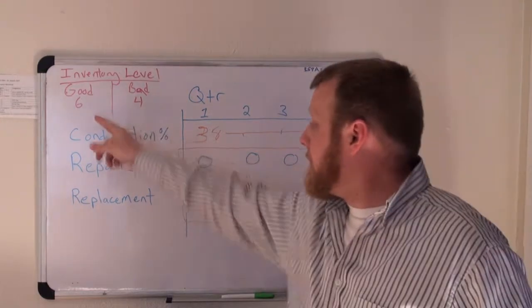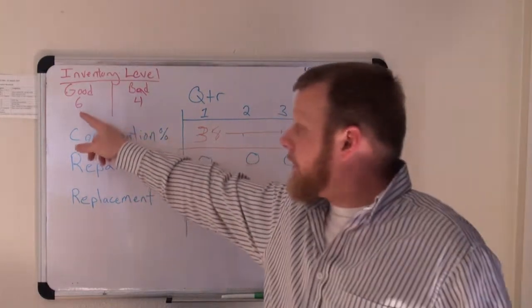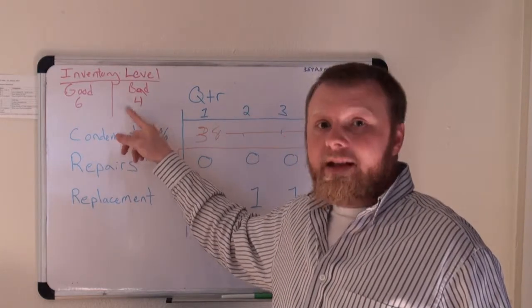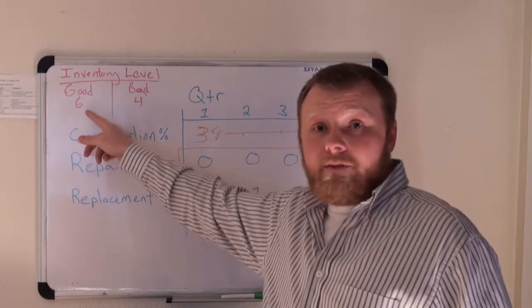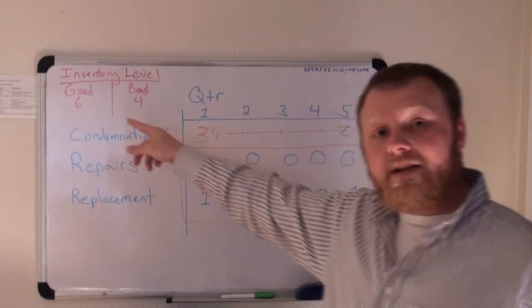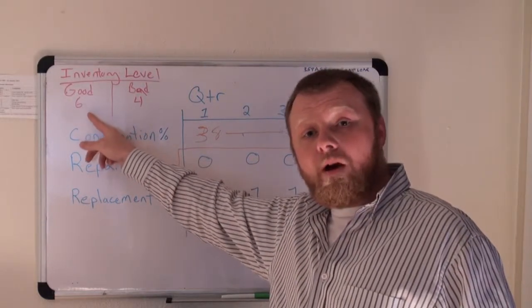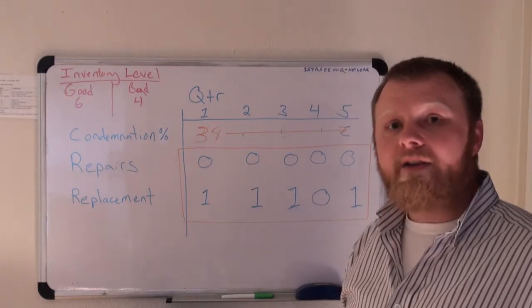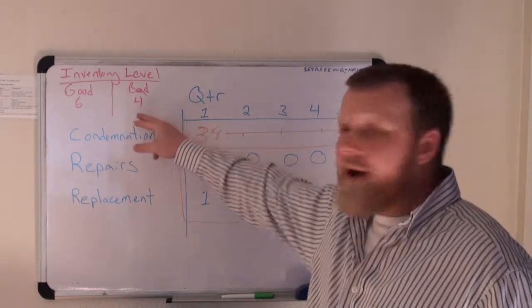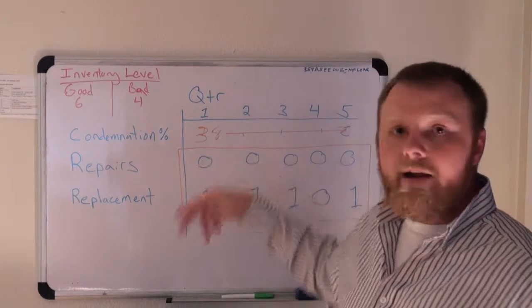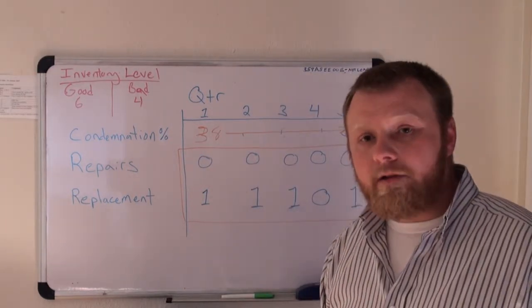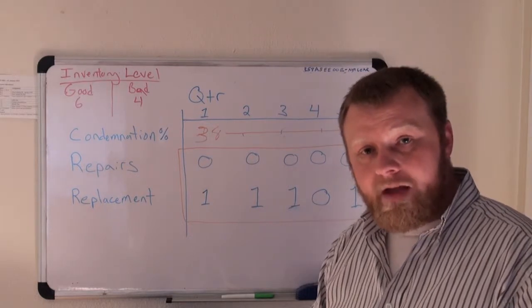And these are coming in once a quarter. So next quarter you're going to have 5 of these and 5 of these. Next quarter, 4 and 6, and so on. You don't have too many quarters to go. Now guess what? If I have 6 quarters worth, and that's it, well, we're going to say we're going to have 9 quarters worth, because we're going to repair some of these at a 38% rate. We're going to get some back over time. So figure 9 quarters. That's a little over what, 2 years, right?